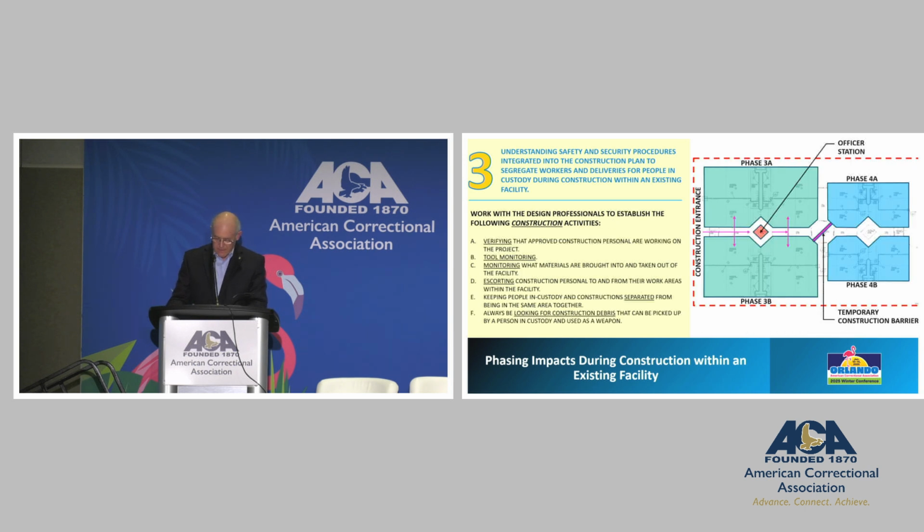Our next item, we just want to make sure that everybody knows and is able to verify that approved contractor and construction personnel are working on the project. They're going to be asked to do tool monitoring. They're going to be asked to monitor what materials are brought into and taken out of the facility. And again, they're probably going to have to be in a position to escort construction personnel to and from their work areas within the facility that you've identified.